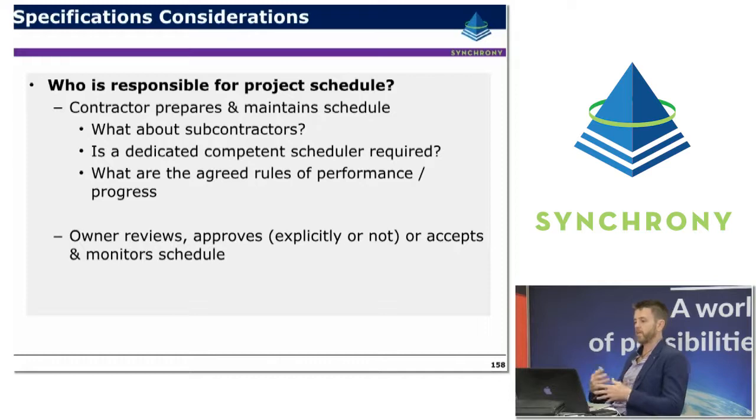Is a dedicated competent scheduler required? So more and more these days I'm seeing requirements for ACE certification as one example of a competency requirement for planners, schedulers and earned value practitioners on projects, and specifying what are the agreed performance measures or progress measurement techniques. There might also be requirements for owner reviews. We mentioned IBRs before, or other different surveillance type reviews.